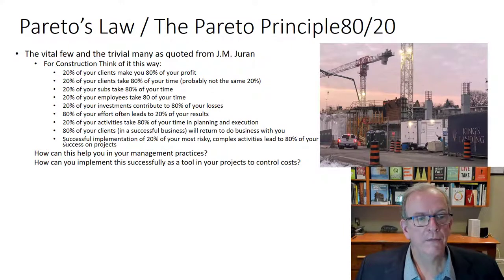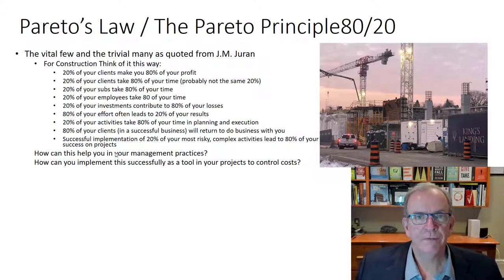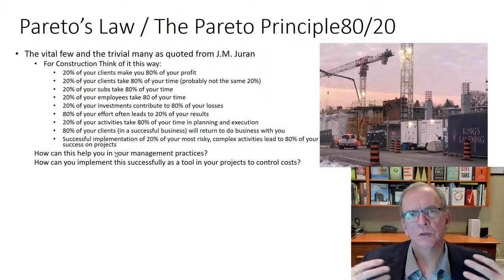Now the one that I very often used, and this ties in with VUCA: if there was complexity in some of the activities I was working on with a project, I would usually try to identify those activities ahead of time. What are the components of this project that keep me up at night, that I can't go to sleep with? It's a good question even to ask subtrades in a meeting. What keeps you up at night? And then you get the feedback, and you can work collaboratively to try to reduce that.